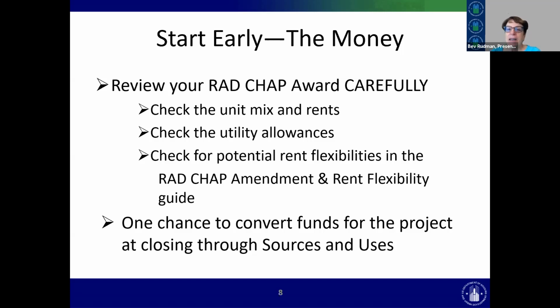The other thing about the money is that there is statutory ability in this program to move money from a PIH account to support this Section 8 property, but only if it is in the sources and uses at closing. I'm sure there are a lot of rules around what you can and can't do, and I don't know those rules.